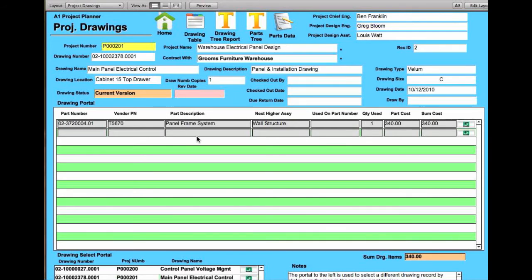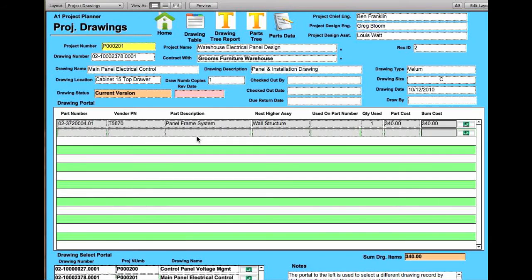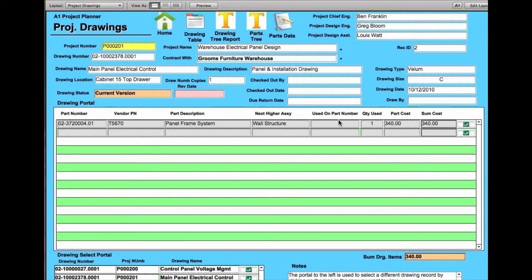Now one interesting part of this is that you can take a drawing and basically duplicate a new project using, if you had the same type of a project that you're doing, using the drawings and then modifying the drawing tree to provide a quote based on the cost. So it's a very important part of the entire project planning to have this kind of information.